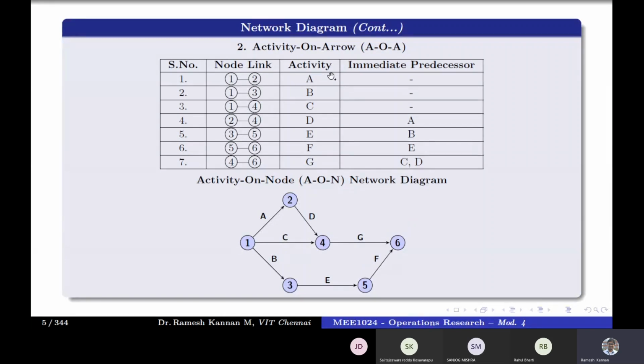Like there's a chronology A, B, C, D, since there are activities we have represented as A, B, C, D. But if you talk about a real construction or a real manufacturing process, say line manufacturing, unless they do fabrication, they cannot assemble. Unless they assemble, they cannot finish it. So that's a sequence, and we cannot break the sequence. Say, for example, I do the finishing job first, without the manufacturing or the assembly.